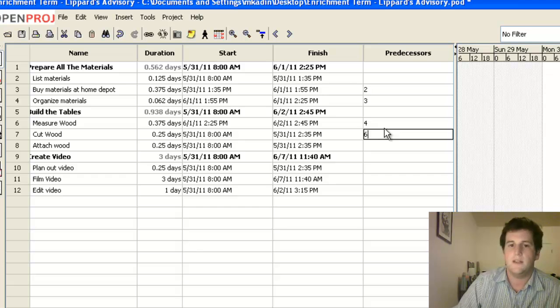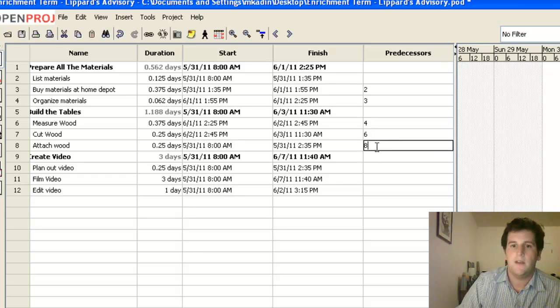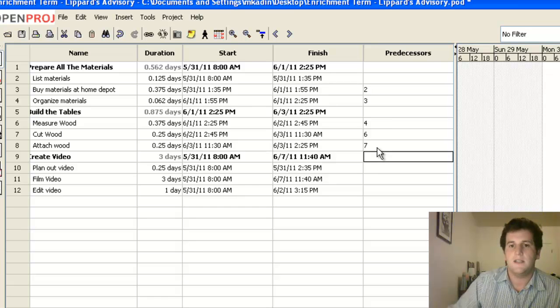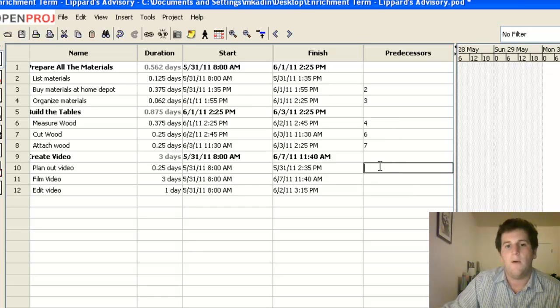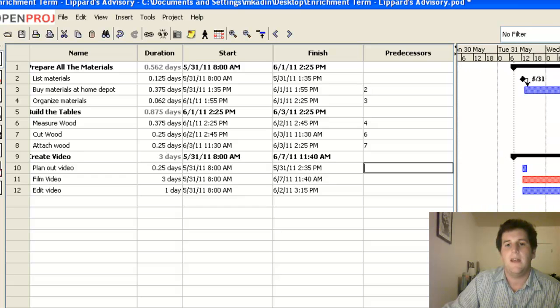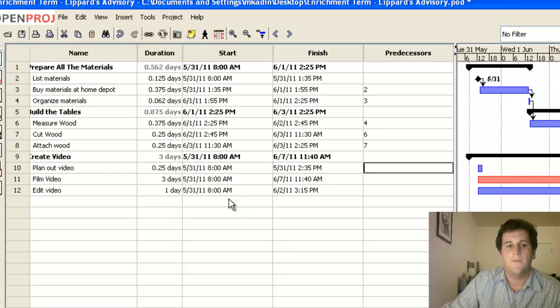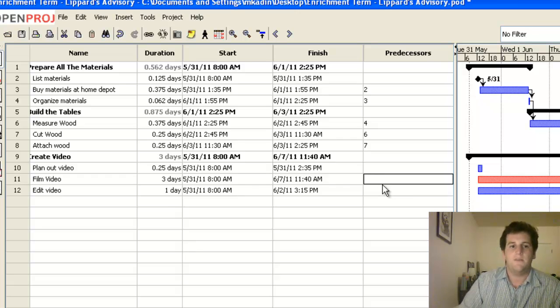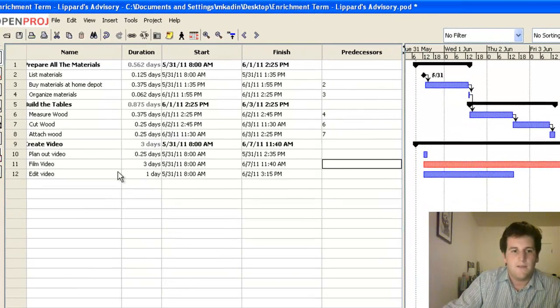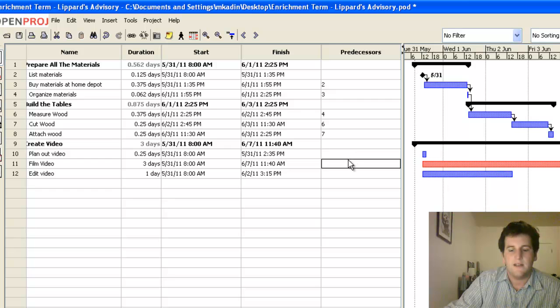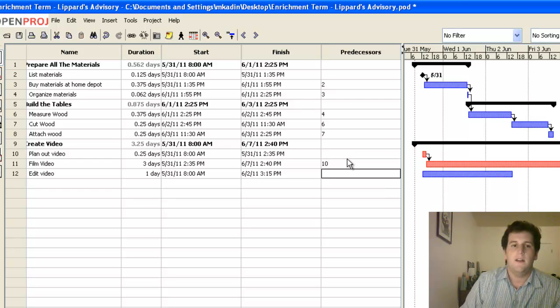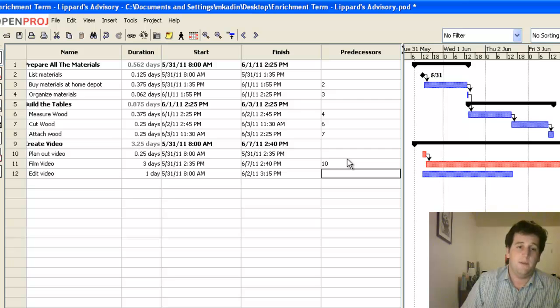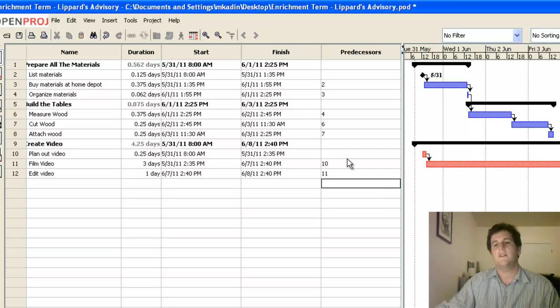I can't cut the wood until I've measured the wood. And I can't attach the wood until I've cut it. So all of these are just adding dependencies to the ones that came before it. However, I can start to plan out this video right from the start. So that's not dependent on anything. But I can't film the video until I've finished planning it out, which means that filming's predecessor is number 10. And I certainly can't edit the video until I have filmed it. So that means that the predecessor here is filming, which is number 11.